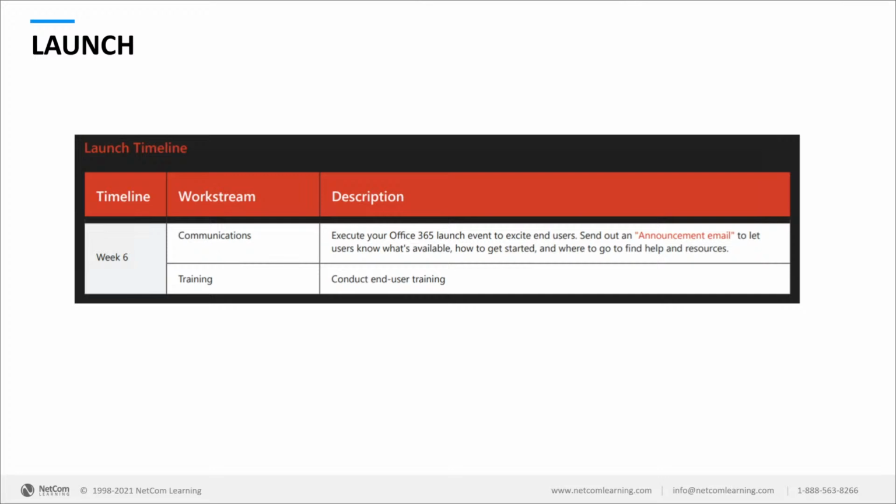My recommendation to you is, if at all possible, when you're doing this, that you do the training for the user the day before it gets put on their desktop, whether it's Windows 11 or Exchange Online or whatever the application is, right? Always try and have the rollout for that individual user happen the day after they've gone through their training. Because if you train them now and then they don't get it for 6 weeks, they'll forget it. And then you need to have really good documentation for them to be able to go back to and refer to make sure that they actually know what it is that you're doing. Or again, they'll get frustrated and not be able to work properly with the tool.